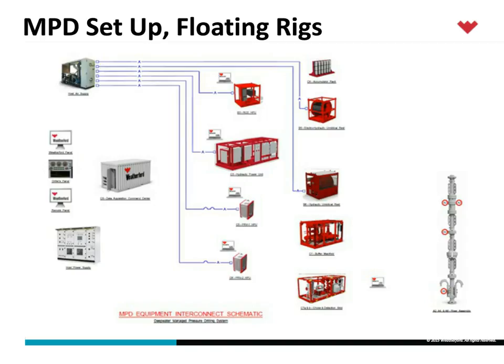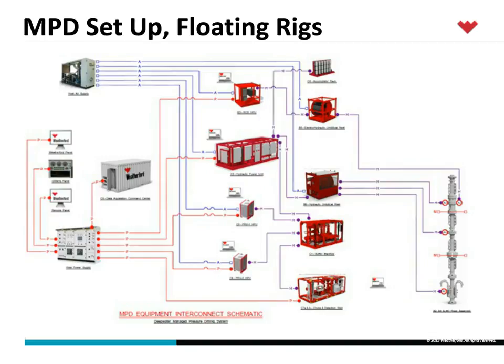In addition, there are hydraulic connections that are surface and subsea — surface stab plates, multi-stabs, permanent tubing, some temporary hoses, and then full subsea umbilicals with subsea stab plates. All of this is not a rental item; it's a bunch of pieces required to assemble a system. All these pieces of equipment require power, and the power requirements differ — the rig may be ATEX, it may be IEC-EX, it may be operating in different areas with different explosion guidelines. We want to make sure we understand the interfaces so that when we install it, there are no issues at installation, commissioning, or systems integration testing — it just plugs in and works as planned.